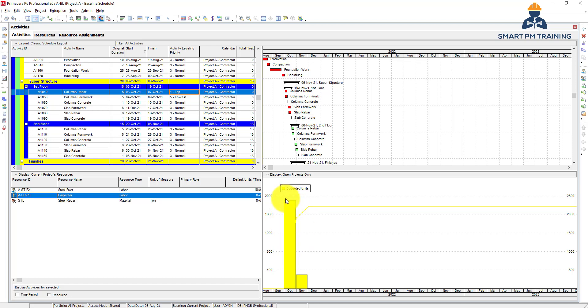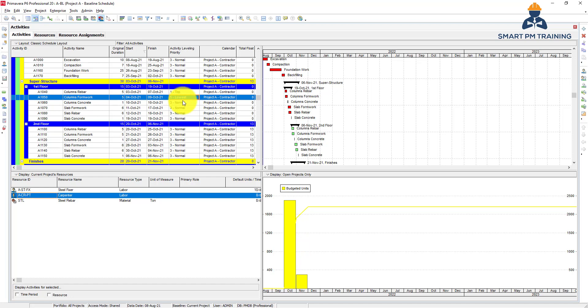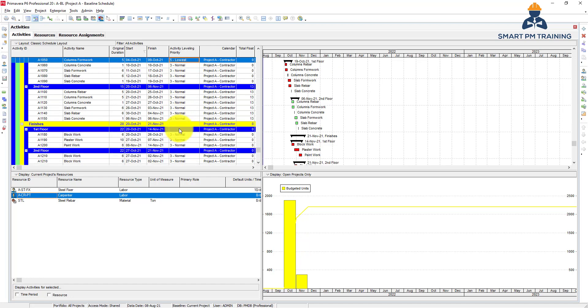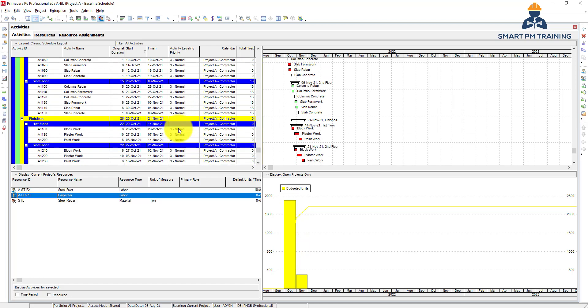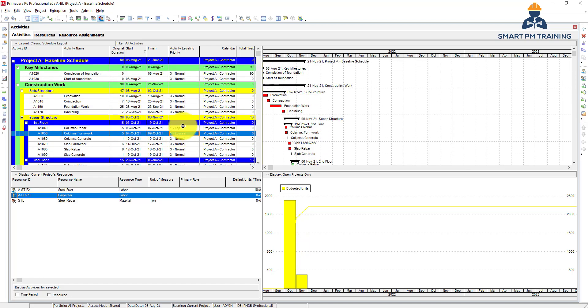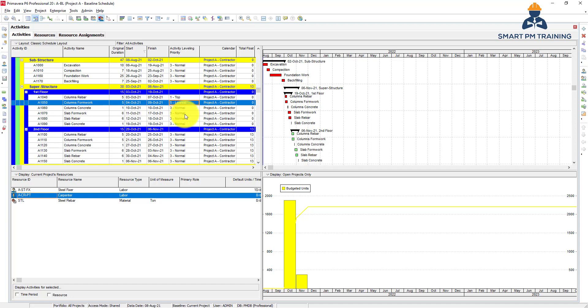Based on your priority, based on whether you decide you want to level within total float or not, and based on the options we discussed in the leveling window, the activity leveling priority is a huge factor.